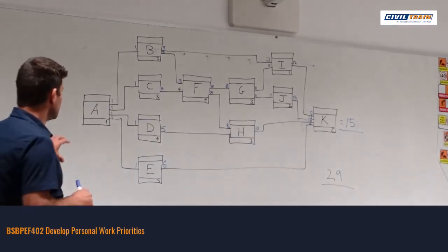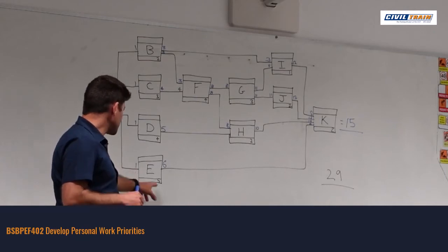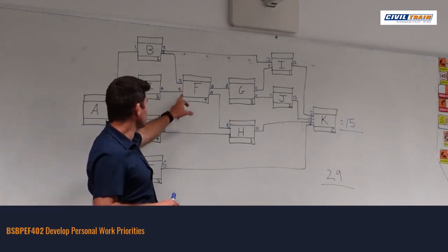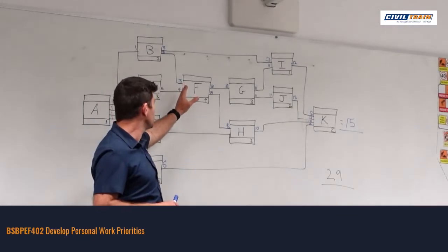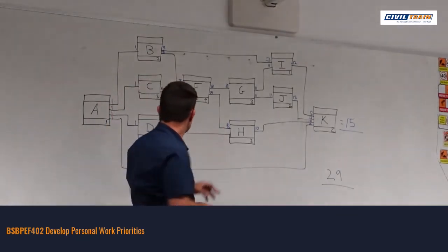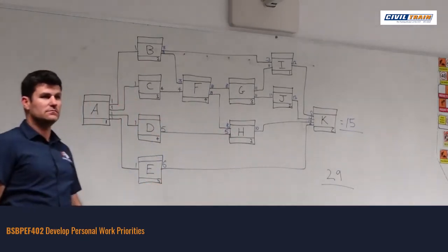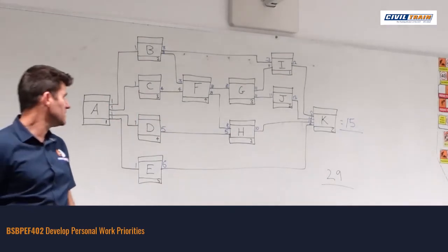So the key factor is take the number out, bring it in, add the numbers together. If I've got multiple numbers coming into it, I would take the biggest number out, add it on, and as you can see, I should add a 5 there. But the 8's bigger.